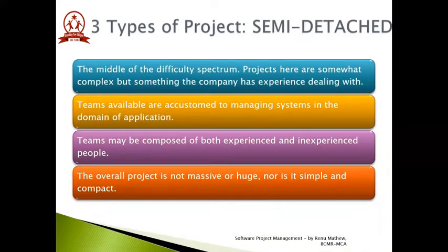A software project is said to be semi-detached type if the vital characteristics such as team size, experience, and knowledge of the various programming environments lie in between that of organic and embedded. The projects classified as semi-detached are comparatively less familiar and more difficult to develop compared to the organic ones and require more experience, better guidance, and creativity. For example, compilers or different embedded systems can be considered of semi-detached type.